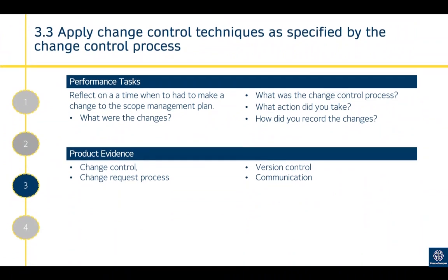Criterion 3.3 is to apply change control techniques as specified by the change control process — following the change control process specific to your programme and organisation. Normally it involves some form of change control committee which regularly meets to review change control requests, and will then either approve, deny, or choose to review them at a later date. Reflect on the time you had to make a change to the project plan: what were the changes, what is your change control process, and how did you comply with it and initiate the process? How did you record the changes?